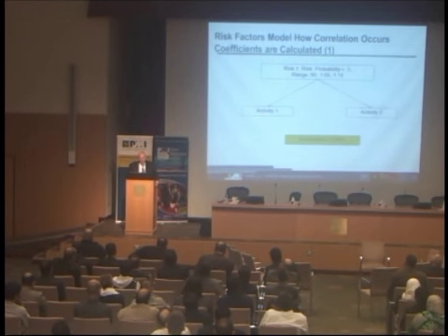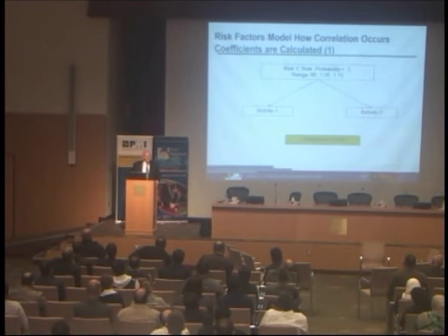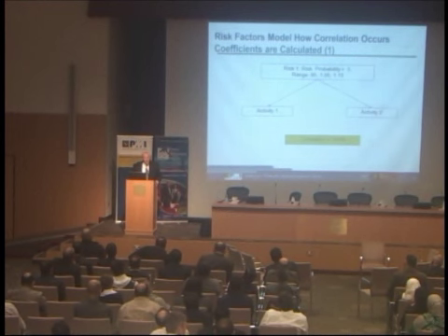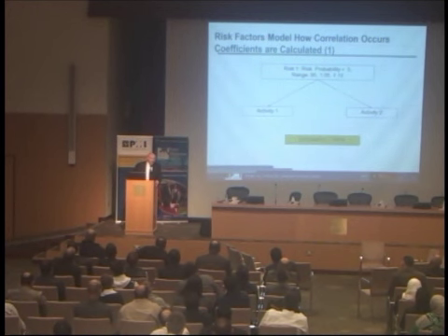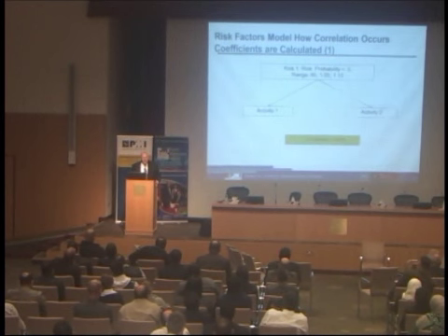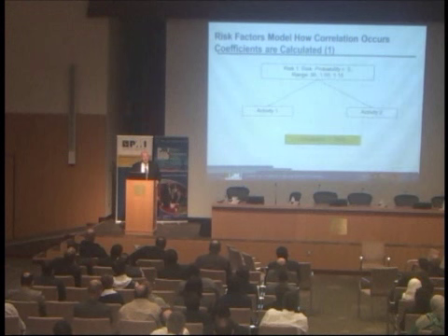Okay, well, that's wonderful. It means that it would be an inconsistent scenario for you to have the price of steel high for structural steel but low for steel pipe. It just is an inconsistent scenario because they're both affected by the world price of steel in the same direction. If one's high, the other's high. If one's low, the other's low. That's what's called correlation. But why are they correlated? Because some risk is affecting both of them. Now we're going to model that sucker. We are going to do a modeling of how correlation arises.